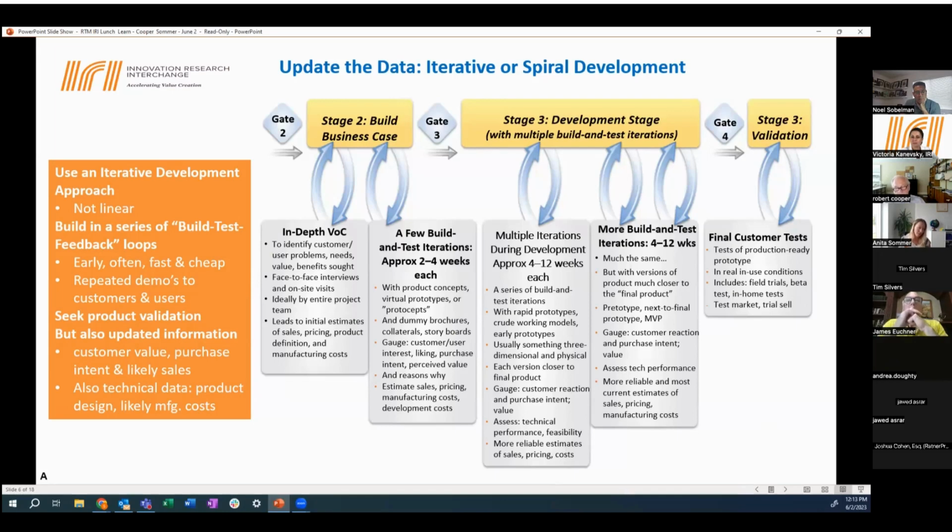Again, back to Danfoss, they even implemented a decision gate where you could not pass the gate to go to development stage unless you had customer or even consumer review. With the thermostat, it was consumer review. I knew some of the engineers sharing that, in the beginning, they were actually a little discontent with having to do all of that work to get consumers in. And they had this brilliant product. Why have to have consumers in really early?